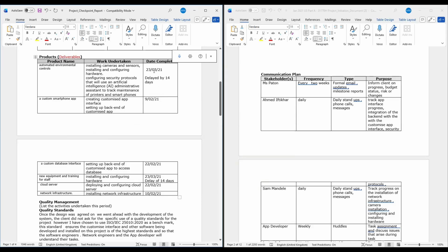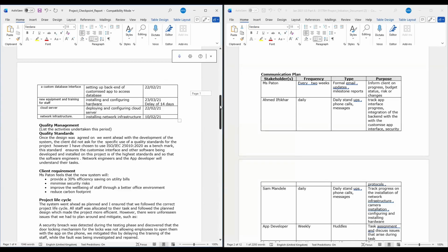And then the date completed, remember, it's the last date. If it was delayed, you put the delayed date that it was completed when you go on the Gantt chart. So you're going to look for what date was completed, like this one that you've calculated, and that's what you'd put here.